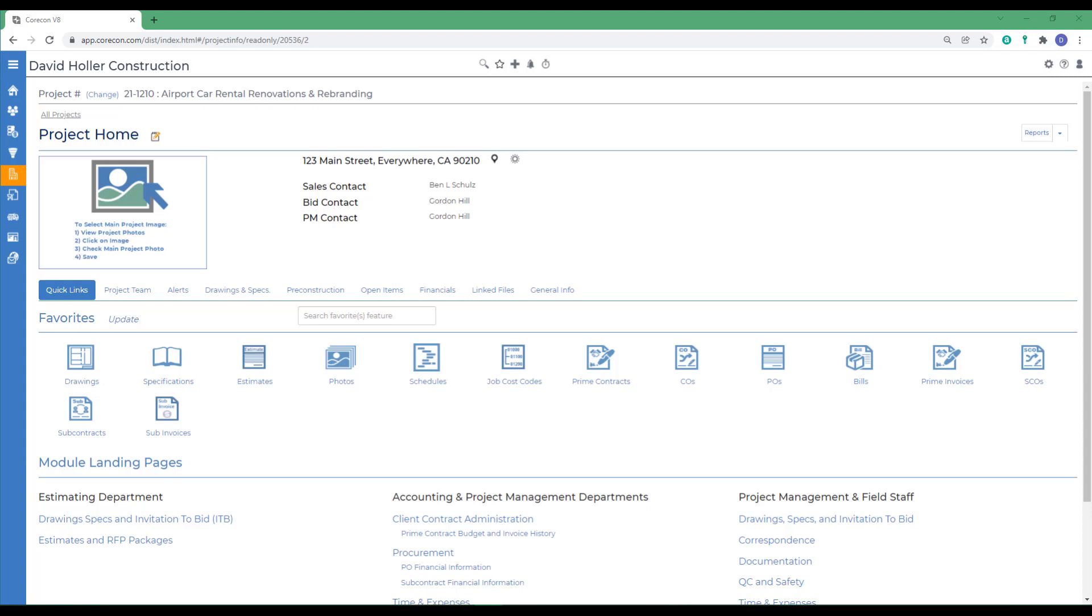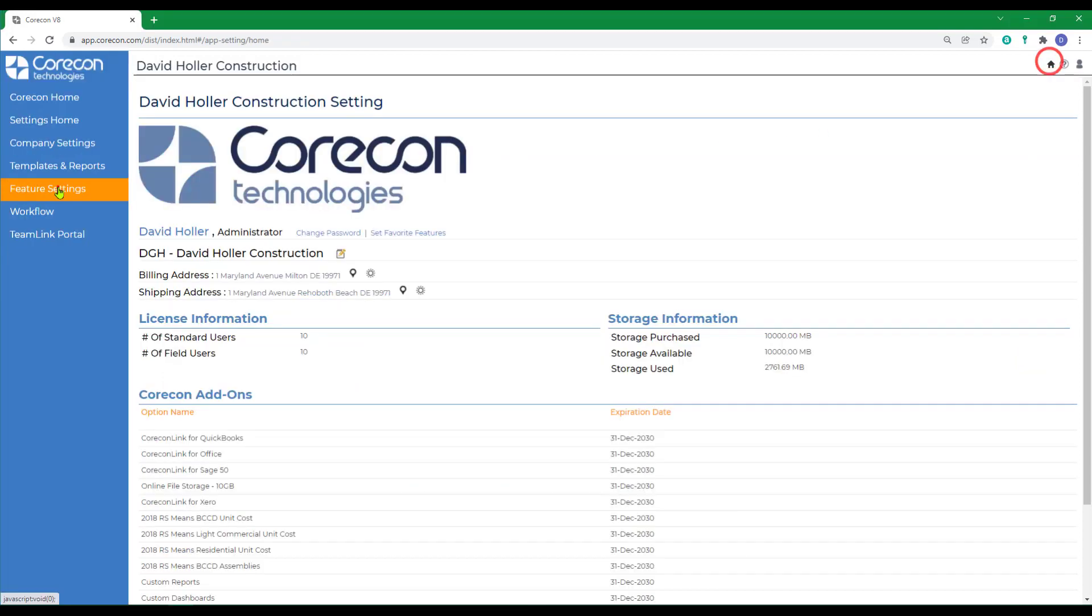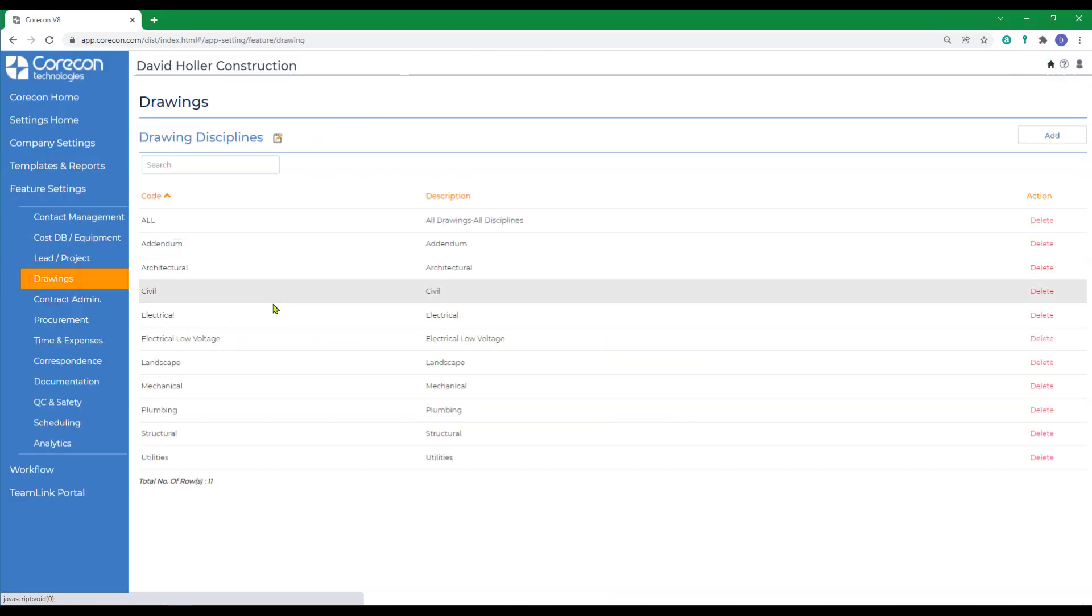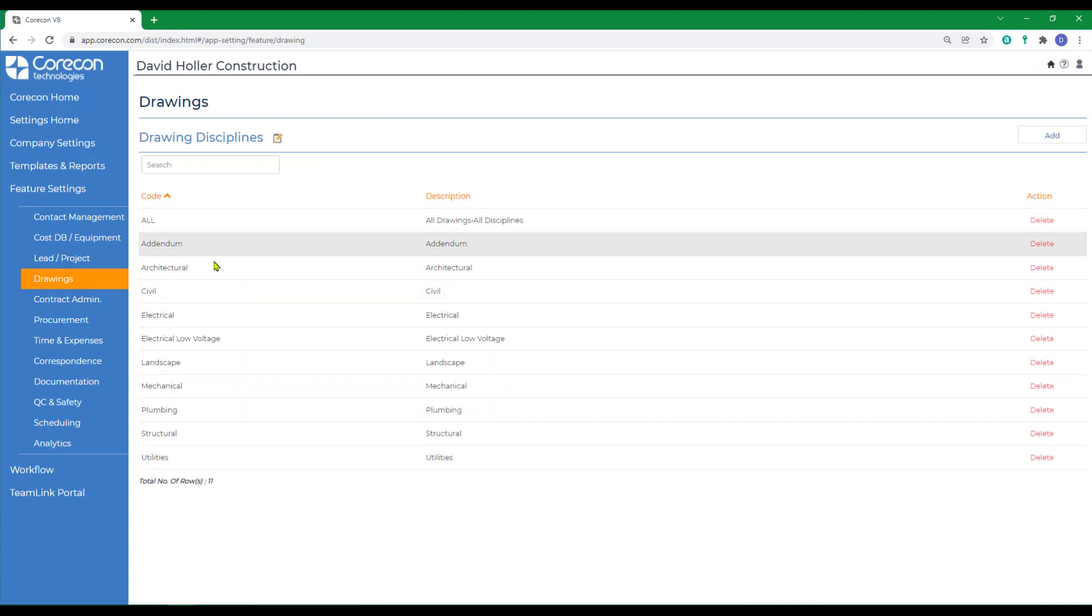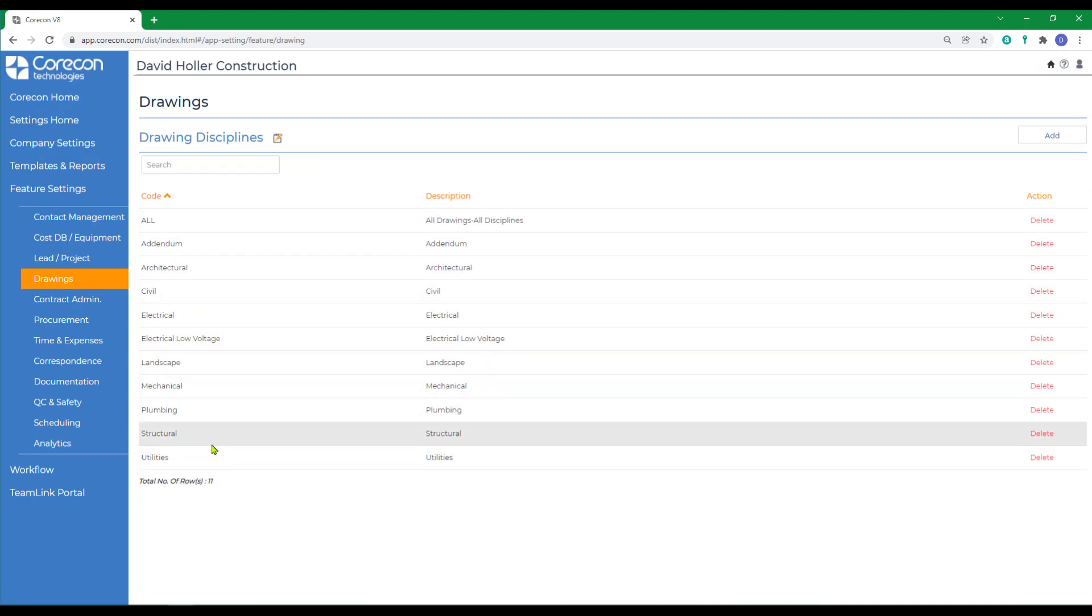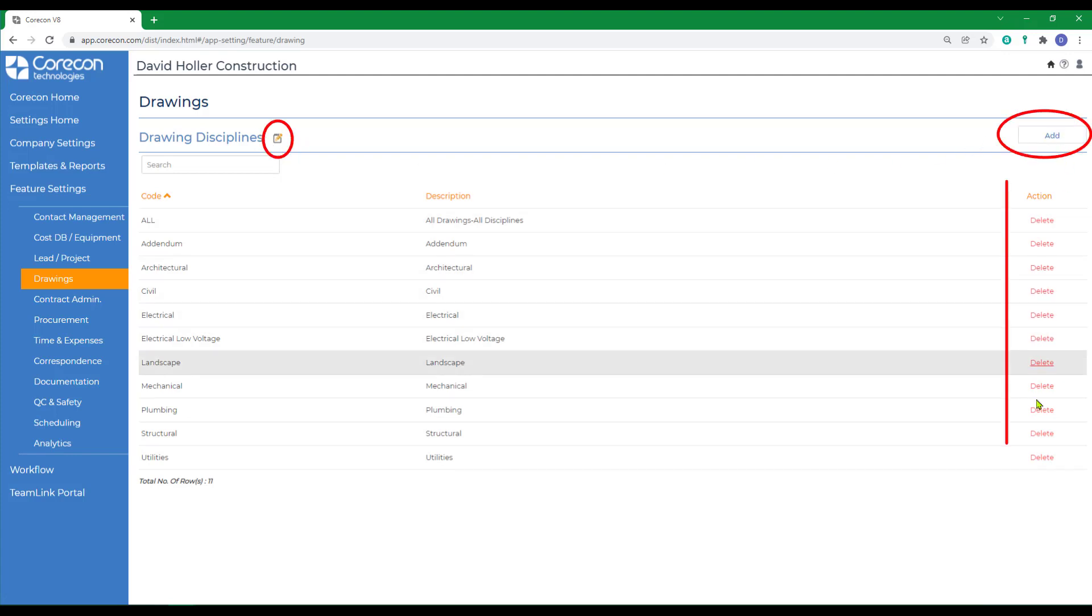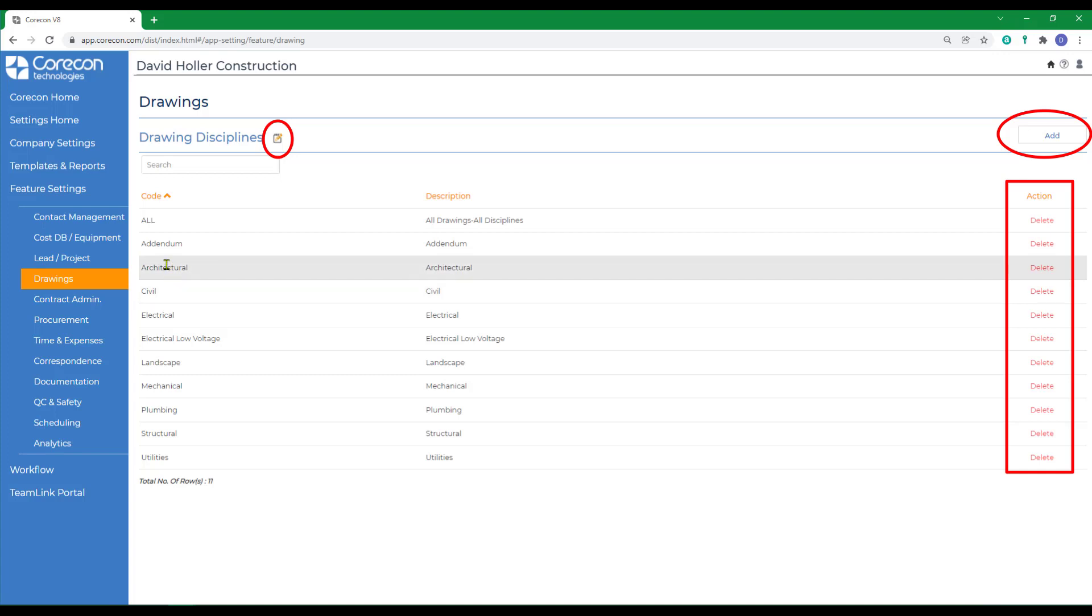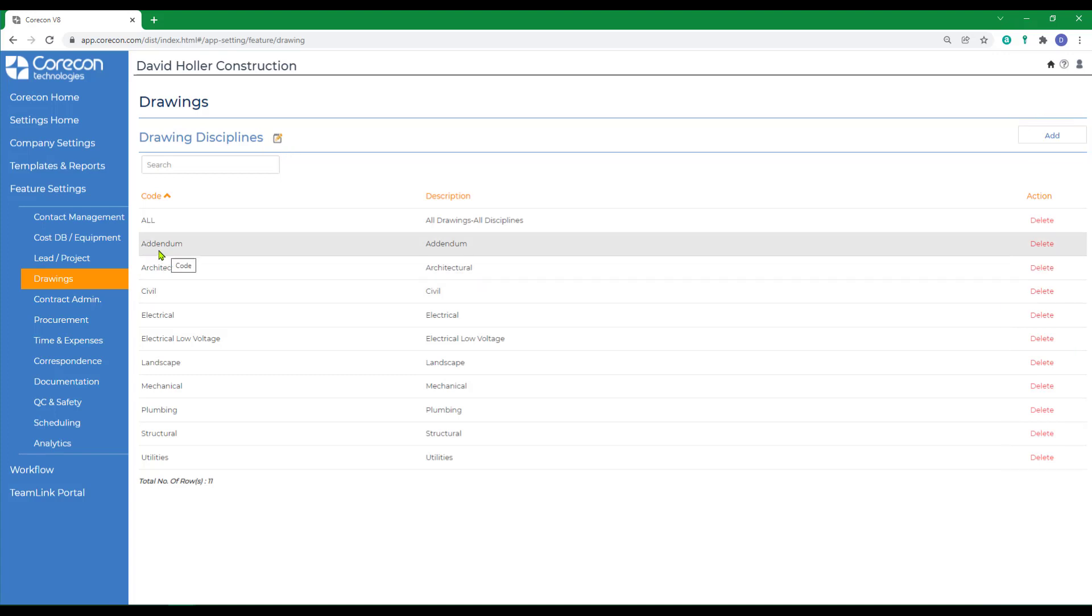Before we begin adding drawings, we should go to the Global Settings. Under Feature Settings, under Drawings, you may want to update the drawing disciplines. The samples that CoreCon provides can be edited, added to, or deleted. We do recommend that you add one drawing discipline called Addendum.